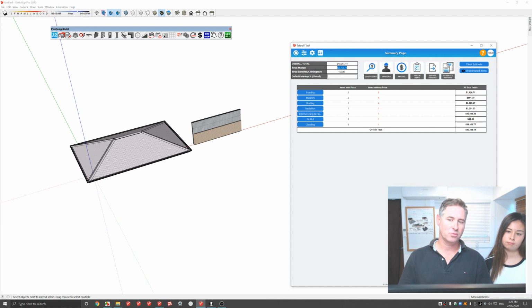Total margin, which would be the percentage we've added on top of the job. Contingency would be, I'm not quite sure what that's going to cost, so I'm going to add in a figure. For contingency, you may or may not use it in the job, you may or may not charge a client for it. And you've got a global percentage markup, which basically means how much you're charging on top of the cost of the materials and labour. So this is basically your summary page.